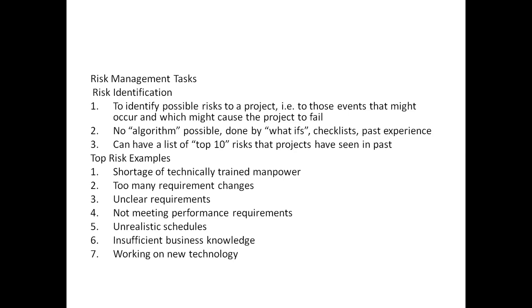The checklist of frequently occurring risks is probably the most common tool used in the industry nowadays. Most organizations prepare a list of commonly occurring risks for projects, and these risks are prepared from the survey of previous projects. So a checklist of frequently occurring risks is a mandatory one.